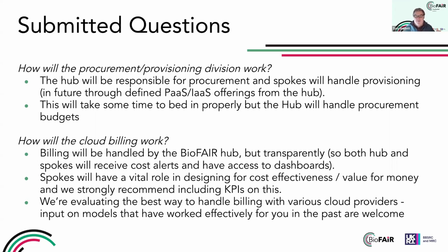We would strongly encourage you to include KPIs on this. So thinking, how much does it cost to run a workflow? Or on average, what's the typical workflow execution cost? Maybe in a range. These sorts of things. So we're evaluating the best way to handle billing. If you've got input on models that have worked effectively for you in the past in the services that you've delivered, we'd welcome hearing that. We are still working with UKRI as well on what the appropriate way to do procurement is. So that's a complicated answer, and there are lots of moving pieces here.